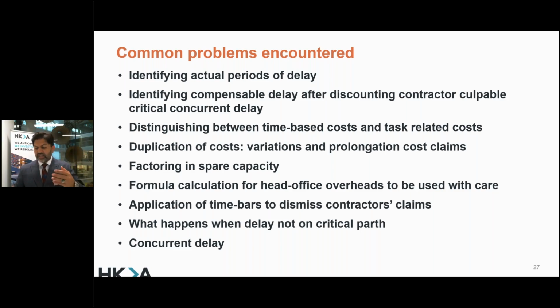So as I gave the example earlier, you were doing some works in January, it's not in critical path, but now you have to do the works in February. What happened? You can't claim an extension of time, you can't claim a prolongation, but you were on site for that 1 week in January, but you couldn't do the works, and now you are doing the same thing in February. So we need to now look into this loss, when the contractor will ultimately be paid for the works, is different. And this is where we need to now think about the link on such issues, how to make a contractor's claim for disruption. So we've looked at prolongation, which is on critical delay, but there are issues that are happening on site, but they're not prolongation because that's not on a critical path, but it is now a disruption claim.